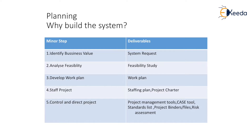In the planning phase, first we ask the question: why we build the system. On the basis of that, some minor steps we have to decide, like identifying the business value. So if we identify what the business value is, on the basis of that we will get some system requirements. Second, we have to analyze the feasibility of a model — like how it is feasible for our future market, so we have to do the feasibility study. Third is the development work plan — we have to develop a work plan for what we are actually going to do, how it is going to perform, and in the deliverable we will follow the work plan for the model.